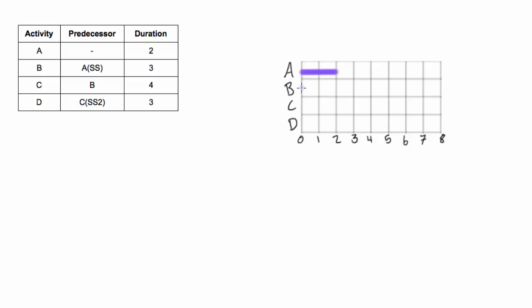So by the start-start relationship definition that's where B will also start. Now B's duration is three days, so we'll go one, two, three. Notice we're not starting at the end of A because that's not what a start-start relationship is.